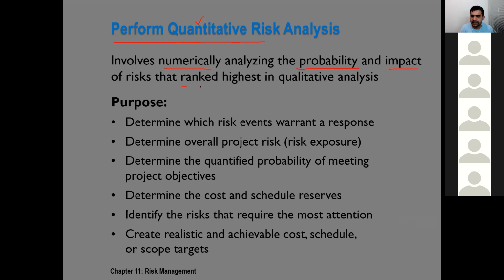Normally, we conduct quantitative analysis on high risks or their grades are high. By doing the quantitative risk analysis, we are able to find which risks require a response, what is the overall project risk or risk exposure.